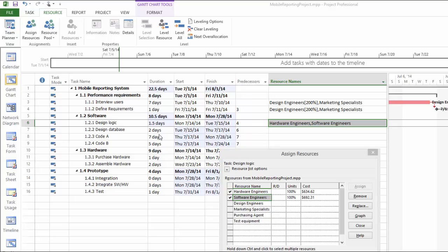To avoid this kind of thing happening to your project, the safe thing to do is, before you enter any of the tasks, make all task types fixed duration, like what we did before. Of course, if you did not do this step, and this kind of mistake does happen in your project, to notice it, every time you assign new resources, you have to watch the duration and make sure nothing changed. If there is any change, or there is a light blue highlighted area, that means something changed, and you will need to go back to the early stage and then reassign the resource.